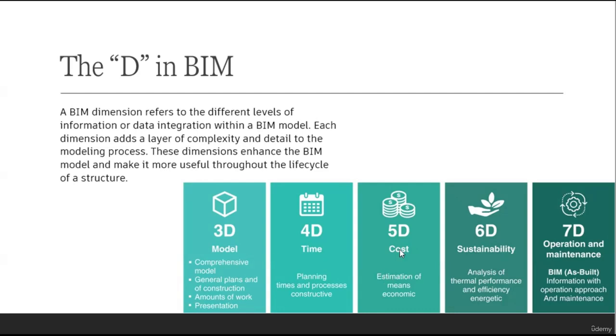Okay. Now the 5D involves the cost aspect of the project. Assigning cost to the 3D elements can help us obtain a 5D cost model. Using the 5D cost model, we can have a one-click access to the cost estimation of the project and can also have the supporting model-based quantities too. Any changes in the model are automatically reflected in the reports and schedules that are generated. So there is a saving of a lot of manual work and any potential data entry errors.